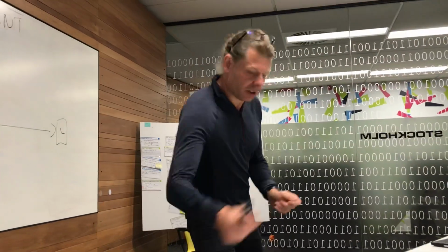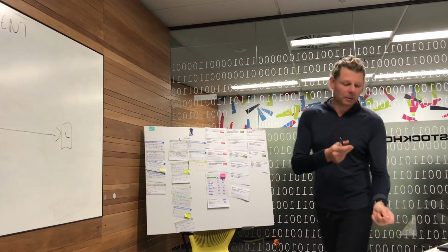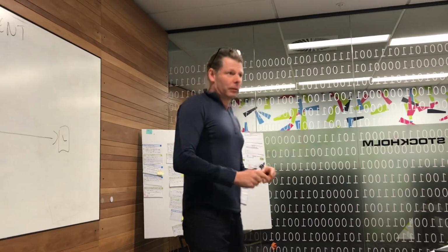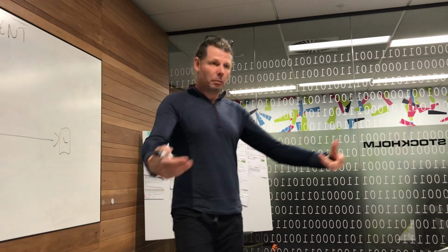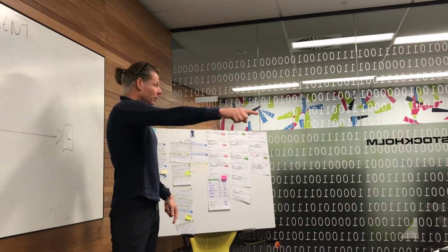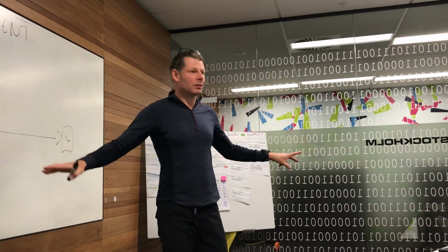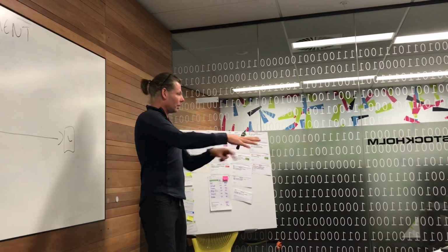This is a bit larger, and that's a bit smaller than the next person, and you're just going to go in a sequence and just put them down like this. We'll do that for 3 minutes. If there's any story you go, we really don't know, I'm not sure, we're going to put it at the top. And once the 3 minutes is up, we'll then go to the ones at the top. Oh, by the way, that's in silence, you can't talk. Talking breaks the system.